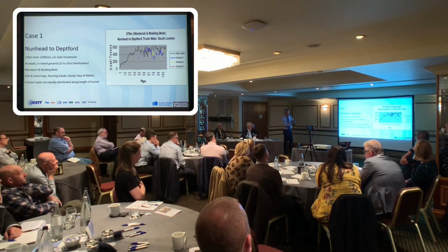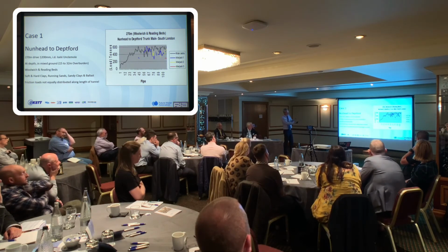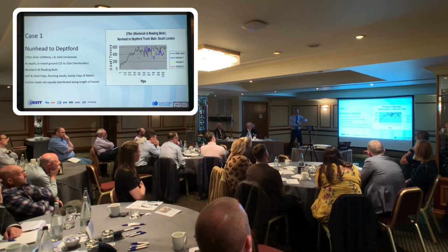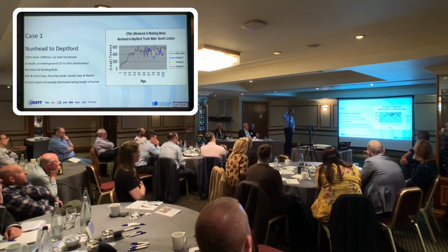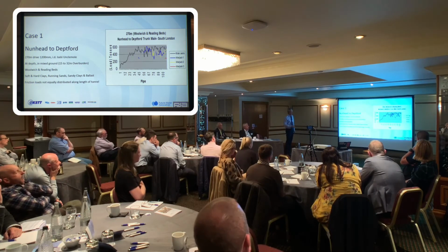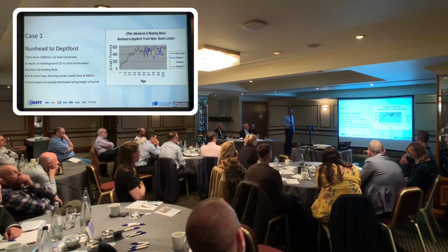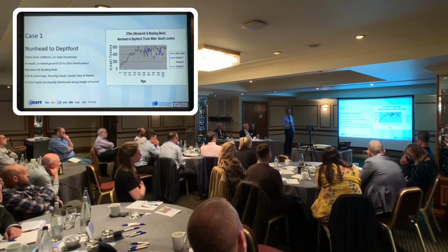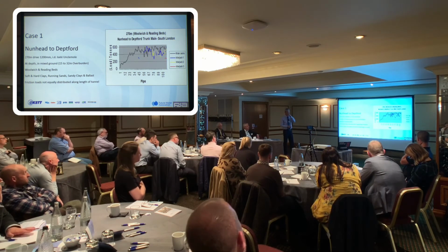And there's an overlay between friction loads related to length and the overburden pressure. This drive was completed one day before Christmas by the skin of our teeth, and we had to use all three interjacks on a 270 metre drive.